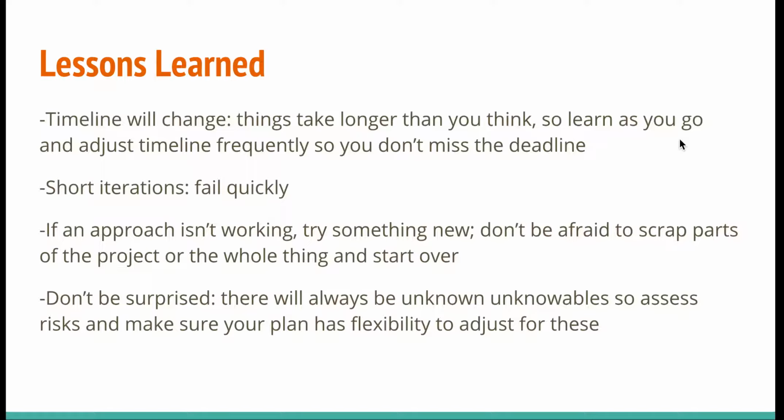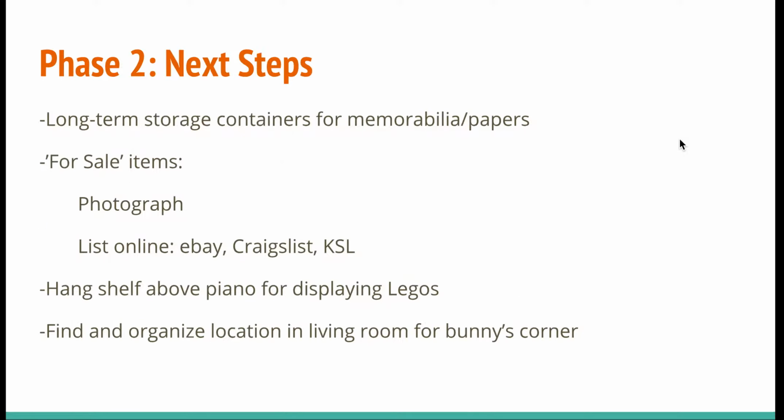research at the beginning. And then by the time I executed it, things just happened where I didn't have the storage boxes that I needed, or David didn't have time to organize his section. So I needed to be able to adjust to those things and figure out a way to move on with the project regardless. So I just need to have more flexibility in my plan and make sure I was continually going back to it, making sure it was updated and would fall in line with what was currently happening, and updating the deadline too. So, next steps for this.